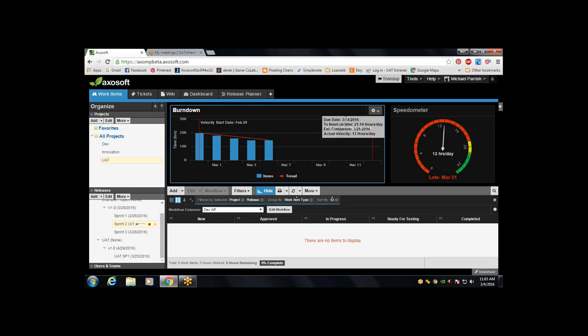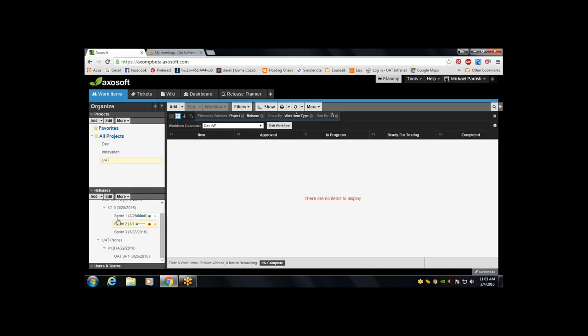Your due date is the 14th. Your completion date is estimated to be the 21st. So we'll quickly know if you guys need to kick it up a notch or you're doing exceptionally. That's the second part, which I'm asking you to put into the post: the actual estimated completion date that's showing up, and then give me an explanation of what you think is happening. Are we on time? Why? Are we not on time? Are we behind? Why? What can we do about that? Again, I want you to think as a team, be self-organized, and be able to collaborate on how we make this better, rather than just being folks who get tasks to do.